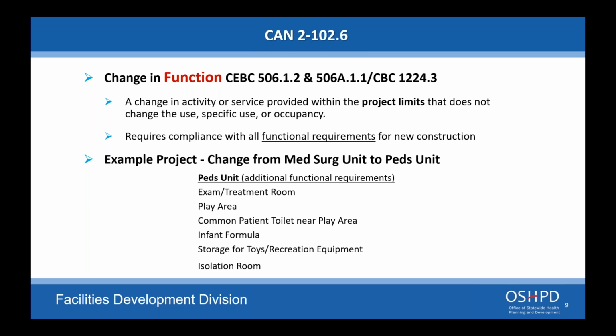They may ask to see. That's why I was mentioning earlier, to contact the CO, your compliance officer. They do want to make sure that the materials being put in are applicable to a hospital or a nursing home or whatever it might be going into. Yes, they may ask about flame spread. Even in re-roofing projects, they're going to want to look at the product going in there, at least look at the spec sheets. Again, talk to them, ask them what they want to see for this.